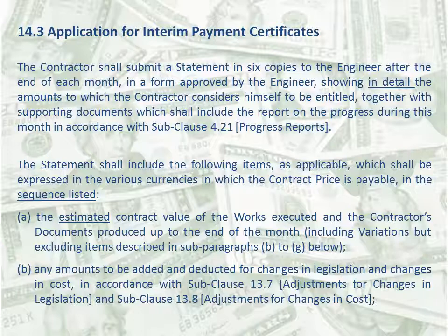And there is no requirement for the works to be properly executed or executed in accordance with the contract. Works are defined to include both permanent works and temporary works. Permanent works are defined to be executed by the contractor under the contract. Temporary works are defined as required for the execution and completion of the permanent works. The estimated contract value must be calculated with reference to subclause 14.4, which is schedule of payment.